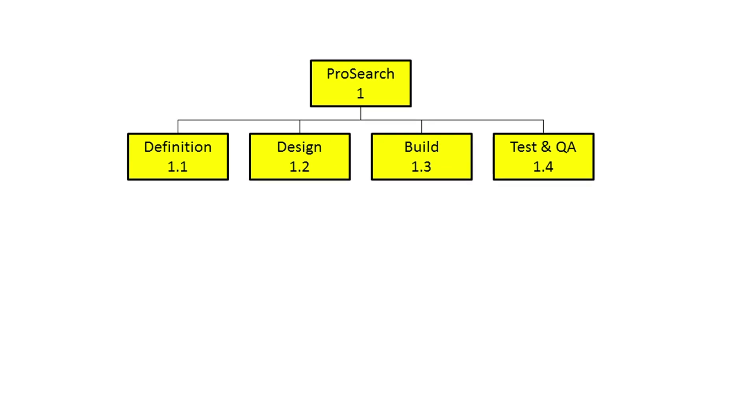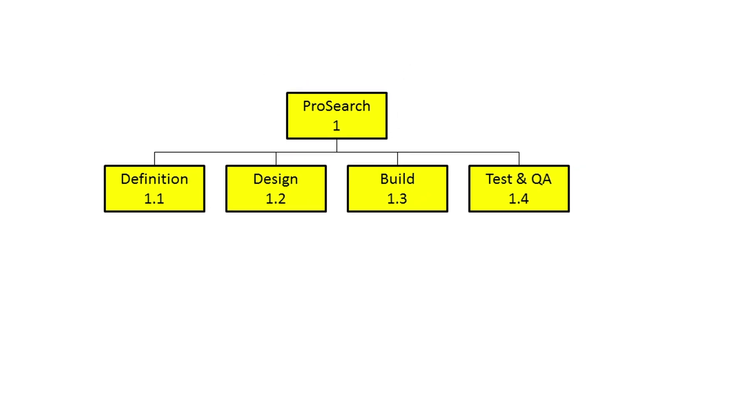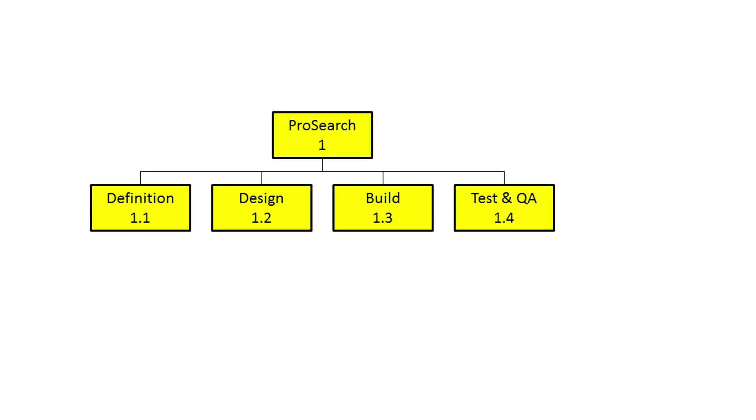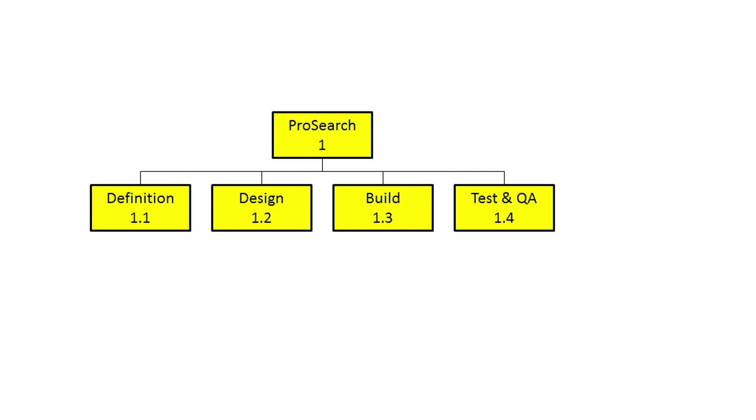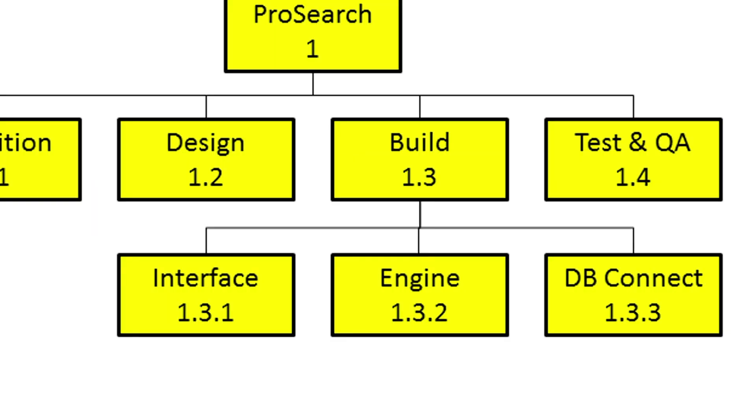However, Build has three main areas of deliverable: an interface that the users will interact with, an underlying search engine, and a database connectivity component. These will all fall under the Build element and create the third level of our WBS.